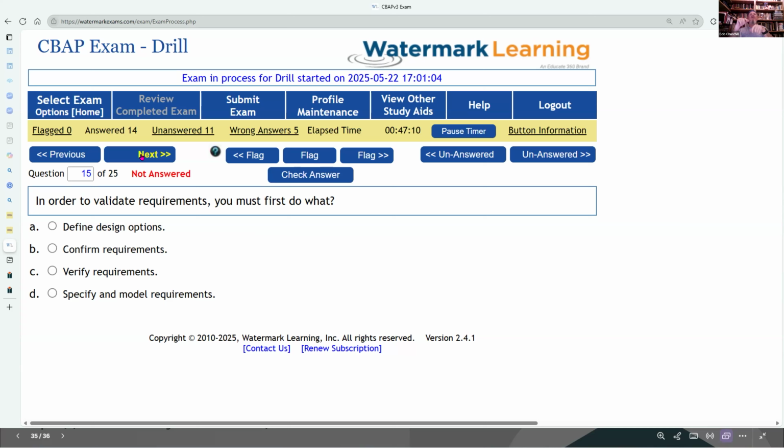And the other thing is, your estimates will be more accurate if you have specific examples of things you've done before. Right. So the more information and experience you have, the better your estimations will be, and the more novel and the more unknown the situation is, the worse it's going to be.